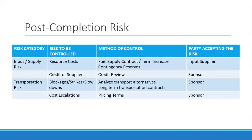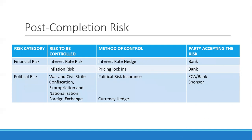Other post-completion risks to consider include supply risk, controlled through fuel supply contracts and contingencies; transportation risk, managed with long-term transportation contracts to control strikes, slowdowns, and cost escalations; financial risk such as interest rate and inflation, managed through interest rate hedges and pricing lock-ins; and political risk, which can be controlled through political risk insurance.